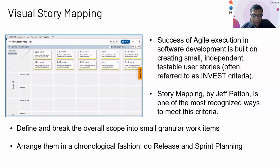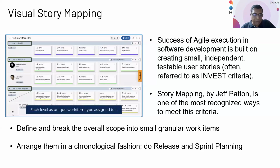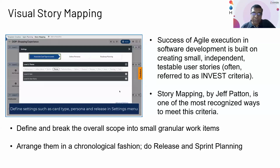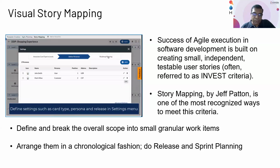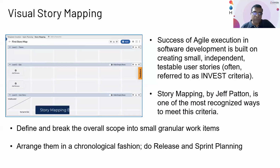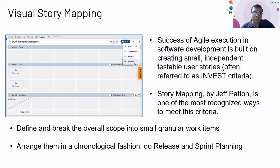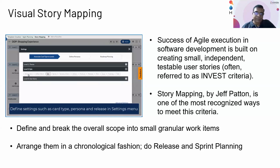Yeah, so you had covered all the key points, but like you said, typically a customer gives a requirement, and a requirement is not a user story. So what we are helping you to do is break it down, take a requirement, and have a structured, logical manner in which it can be broken down. And then from the story mapping view itself, you will be able to see which stories are in the backlog, which stories have been assigned to multiple releases and sprints where its actual execution is taking place. So the whole life cycle basically gets covered in this module, and it happens in a visual manner, which basically helps the product owners, the customers, the relevant stakeholders to easily visualize and understand what is basically going to be done or delivered. Perfect. All right.